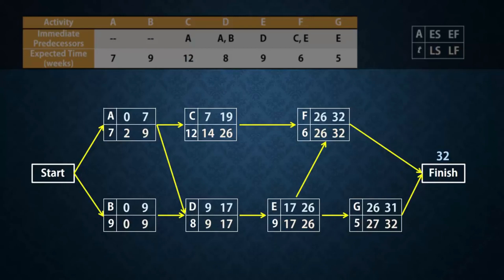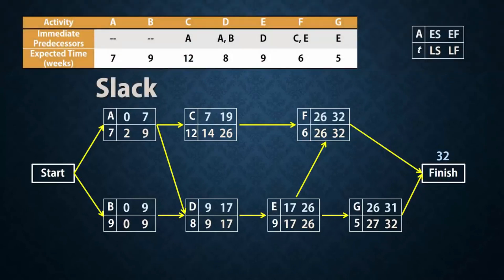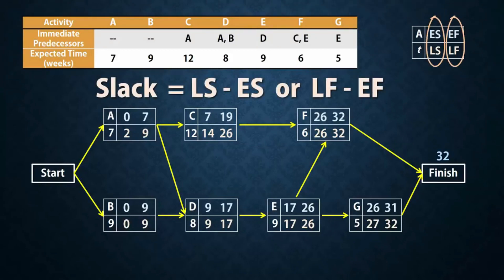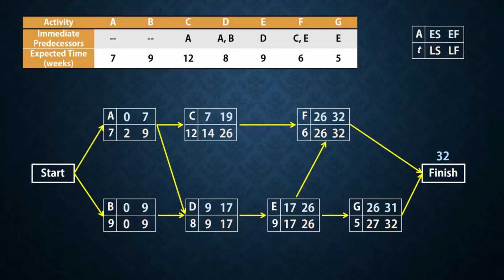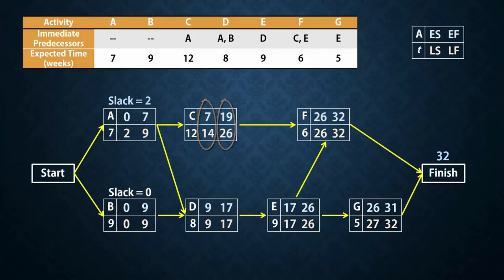Slack for an activity is defined as how long the activity can be delayed without extending or increasing the project's completion time. It is calculated as LS minus ES or LF minus EF. So the slack for A will be 2 minus 0, or 9 minus 7, which will be 2. The slack for B will then be 0. For C it will be 7. For D, 0. For E, 0. For F, 0. And for G, 1.